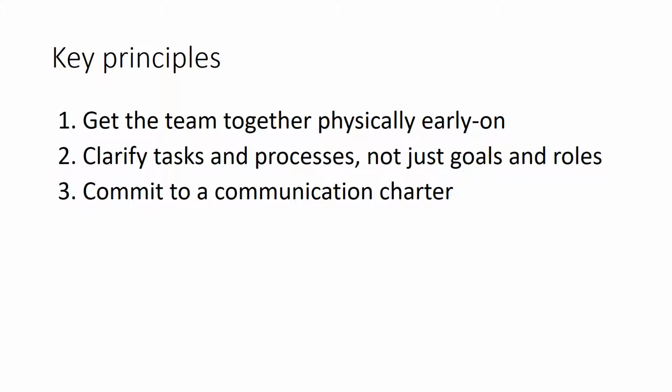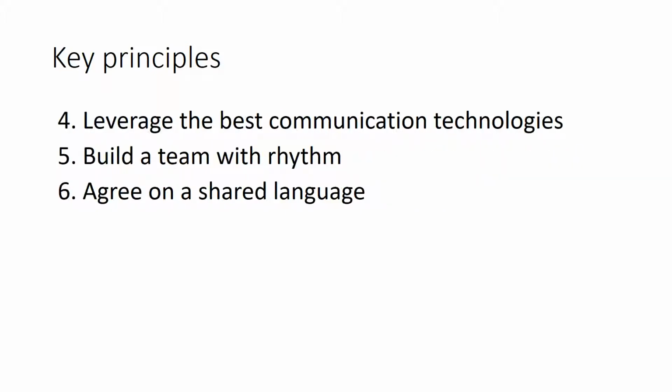There should be a commitment, a communication charter. Again, you need to define when and how we communicate. Usually for virtual teams there should be a specific schedule, like every Monday morning we have a Skype call to discuss project progress. It's very important, especially for virtual teams.